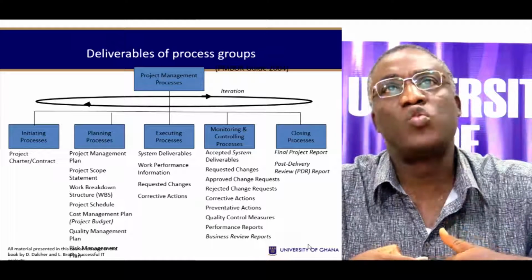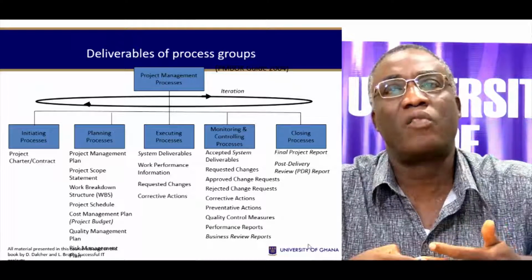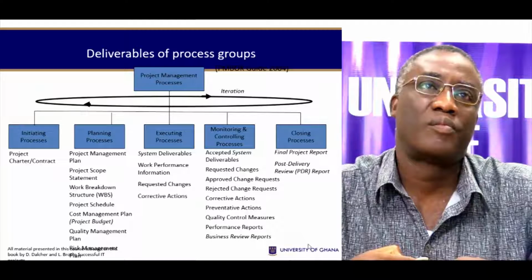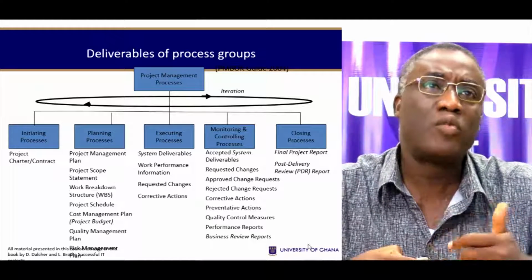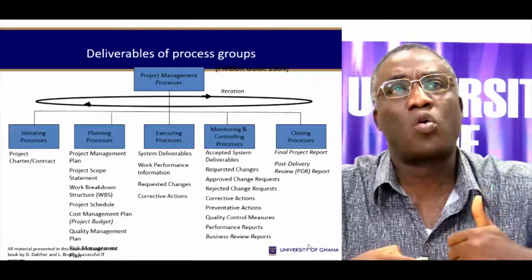So what things do you deliver at the end of these process groups? In the initiating process, the deliverable there is a project charter or contract.